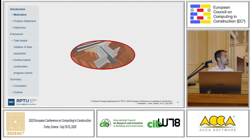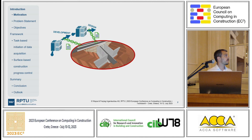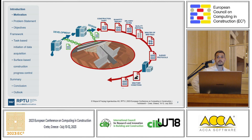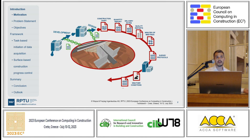What about my motivation? Since I'm quite interlinked with my practical colleagues on site, I know that BIM models are quite interlinked with the actual construction site for the development and design phase. If you're using a BIM model for the design phase, it's working quite well — you get all the information you need. But when it comes to the execution phase, it doesn't really work. We are at the beginning of BIM use cases implementation, but researchers have noted there is not really extensive use of any BIM models. That's not just our company — it's common practice in Germany that BIM models are used in the design phase, but then in the execution phase, there is actually no use of it. That represents my broken chain.